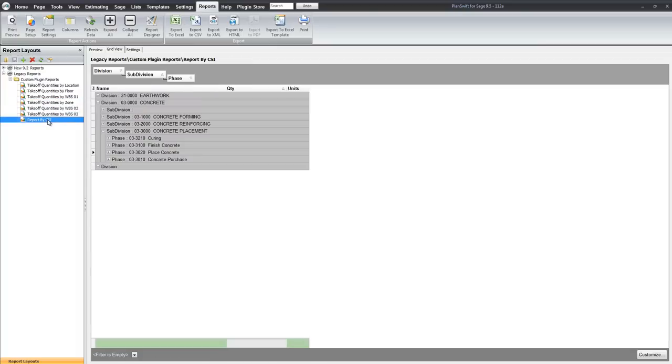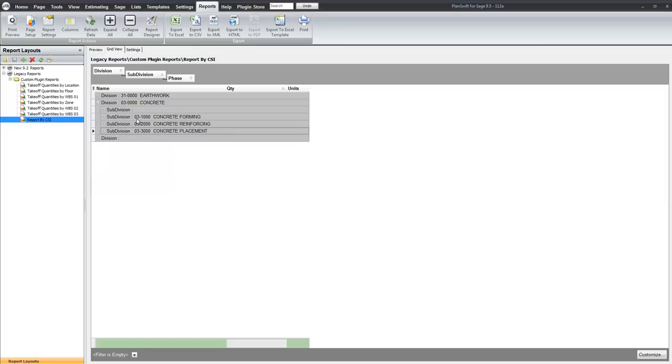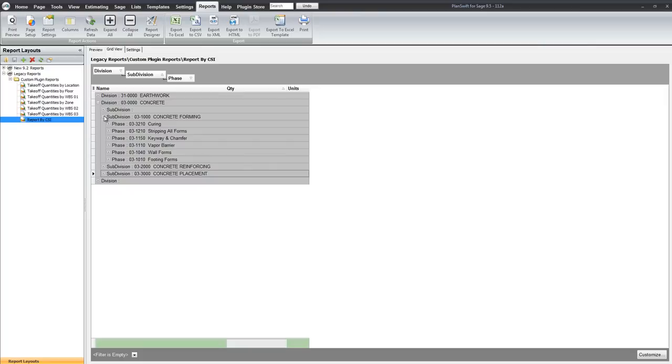Here is the CSI codes where we are looking at 03, 1000 for forming, 2000 for reinforcement, 3000 for placement. And then we can see the work that is underneath each.